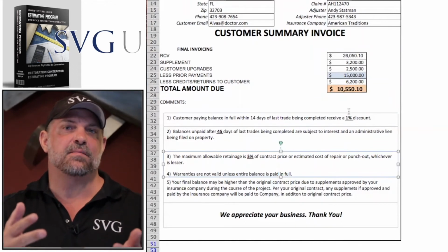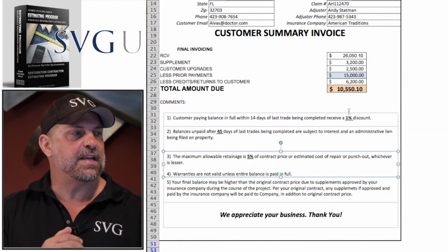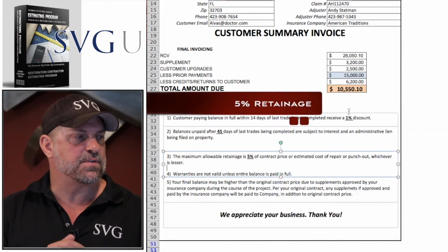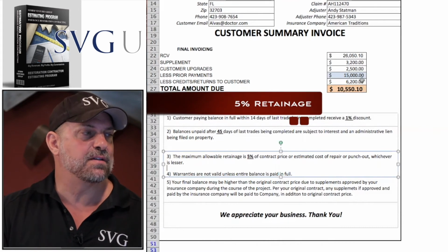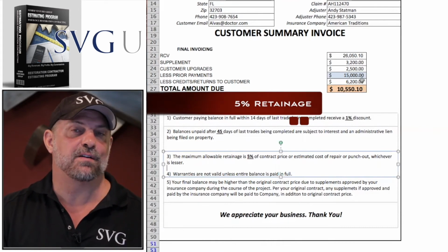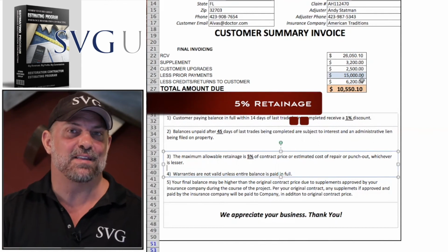Look, you're going to fix the items, but it's customary in construction to have retainage. So if you have a simple policy of 5% retainage, that means that they can hold 5% of $26,000, which is roughly $1,300, but they still got to pay you your remaining balance of your contract. Guys, you're running a business. You can't let your customers hold $15,000, $20,000, $30,000 when you have a dented gutter or a crack in the driveway. Use retainage and your cash flow will improve greatly.